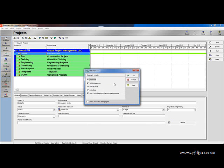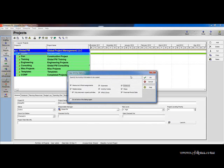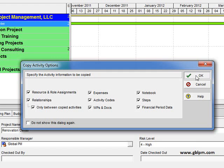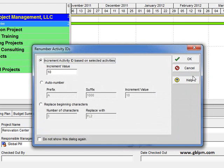I am going to leave all these checked, hit OK again and OK one more time. Now I need to specify how I would like my activity IDs to renumber.